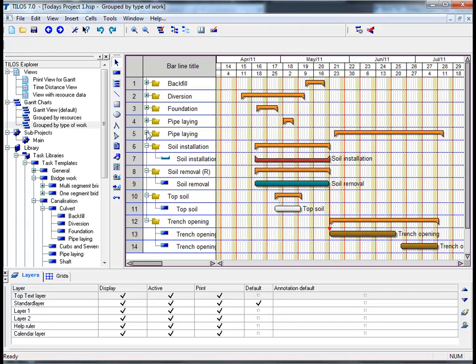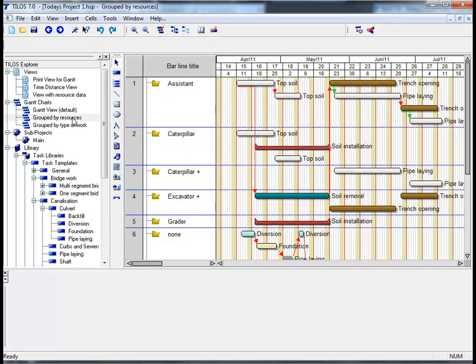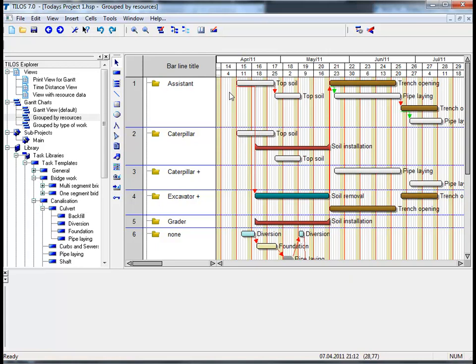Last but not least, if we click on grouped by resources, we can see that we can display the assigned resources as a Gantt chart in order to identify where a resource has been assigned. For example, if we look at the assistant as a resource, we can see that he has been assigned to a number of tasks or activities.